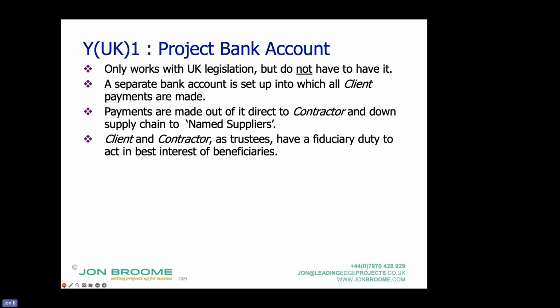And when I say down the supply chain, that can be not just second tier, as in subcontractors, it can be third and fourth tier. The client and the contractor are the trustees of that project bank account and therefore have a fiduciary duty to act in the best interest of the beneficiaries, which are the named suppliers as well as the contractor, right? But not to put the contractor ahead of all the others. So that's how it works.